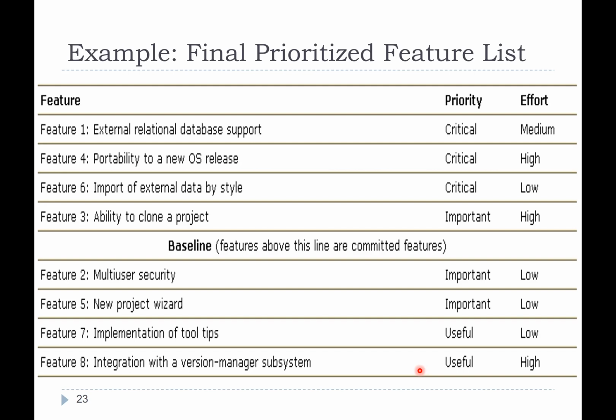And what you see in the second version is leftovers, the useful features from version 1 that you haven't had the chance to do, like anything below the baseline. Exactly, in addition to obviously new features and new things that come in. The new features might actually end up pushing those luxury or useful features back again below the baseline, and then it gets pushed on and on and on. It might one day expire. But this is how it works. A lot of these games have that situation where a lot of the features that you see in this version were actually thought of in the previous versions, just didn't have the time to do it.